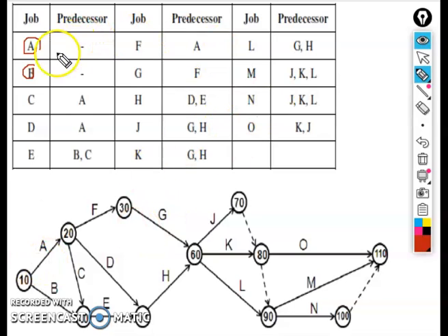So here the starting activities are A and B because they don't have any predecessor activity. So we start our drawing from here, A. Next we start our drawing here, this one is B. Okay, next you have to recognize when A ends, how many activities can start.